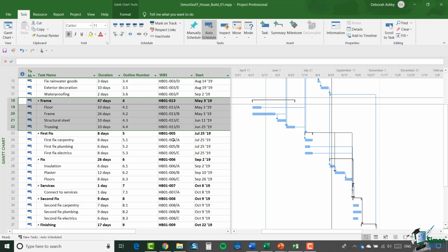So although the WBS code behavior seemed at first to be better, there are some inherent problems with this as well. One key aspect is that when we're dealing with either outline numbers or WBS codes, and in our case we're actually dealing with custom WBS codes, Project 2019 does do the maintenance on those codes. It does make changes to them. It uses its own internal intelligence to decide when they need to be changed and in what way they need to be changed. And sometimes what it does may not be quite what you want it to do.